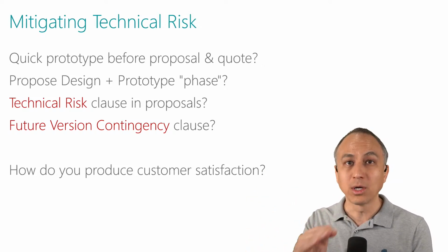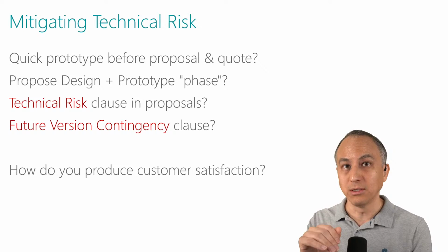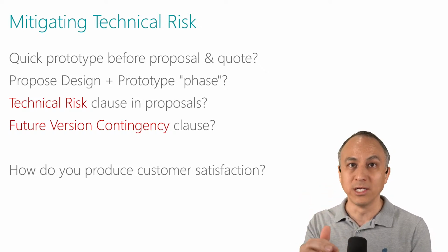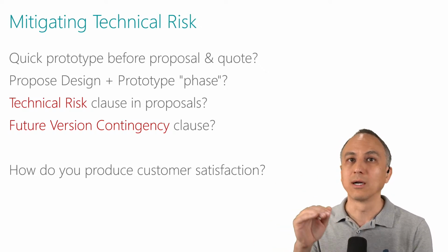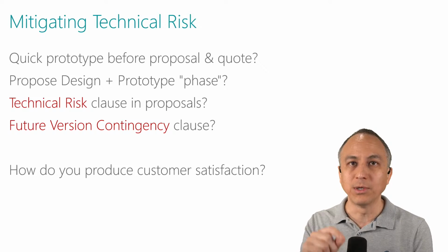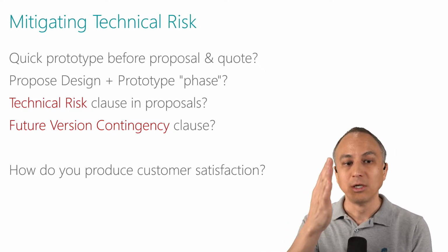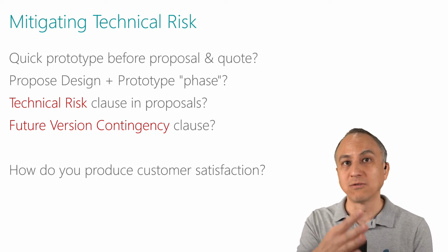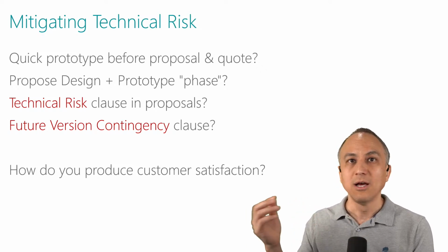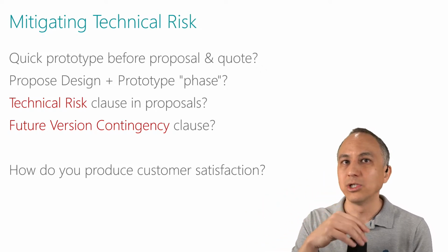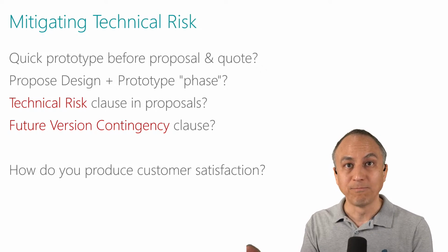Essentially, that's a very low cost, very low risk solution because we know configuration packages. We know they work. They're simple, they're reliable, but they're manual. But hey, say, hey, customer, do the configuration packages for 3 months or 6 months. Instead of hourly or daily, just do it daily or weekly, right? To minimize your manual effort.